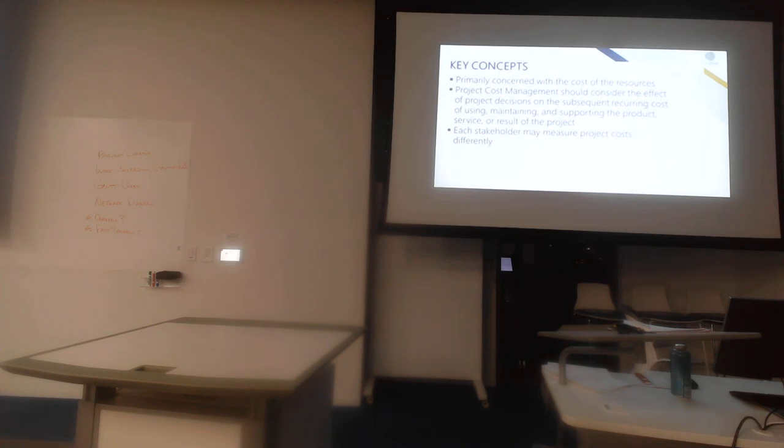Another example is the cost of an acquired item may be measured when the acquisition decision is made or committed. The order is placed, the item is delivered, or the actual cost is incurred or recorded for project accounting purposes. So again, these are some of the areas that you need to understand as a project manager.